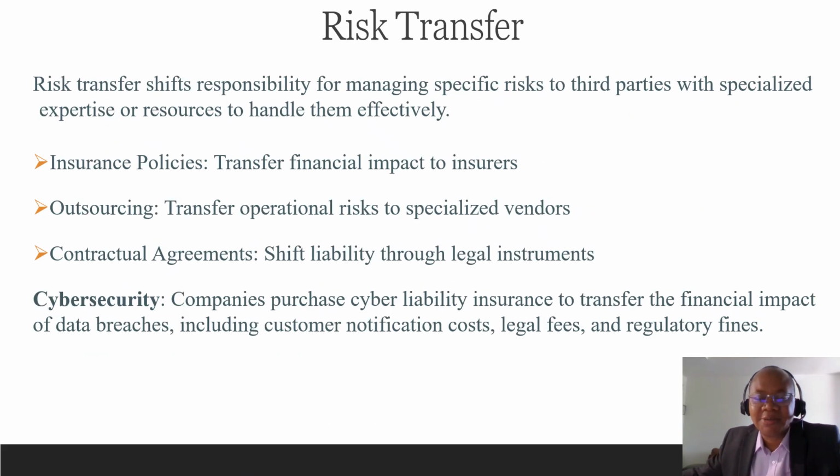Risk transfer is the last risk response strategy for negative risk. This involves shifting the responsibility for managing specific risks to third parties with specialized expertise or resources to handle them more effectively. Insurance policies are very typical examples. You transfer the financial impact to the insurers, for as long as you pay your premium monthly or annually as agreed.